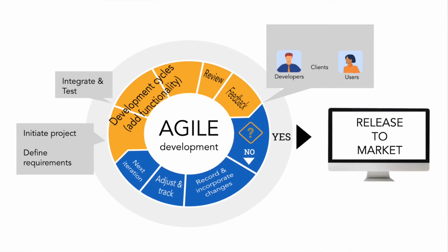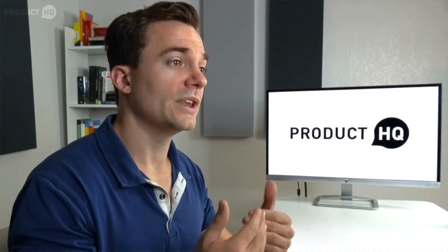Now, let's go ahead and take a closer look at how to balance these three constraints in a practical setting. In the traditional software model, project managers fix the scope by creating a big, thick bundle of requirements up front and agreeing to deliver them all. As development gets underway, the team deviates from the original optimistic plan, be it that things will run late or their cost increases. And this situation helps us to understand human anxiety a bit more. When faced with a fixed scope, late and over budget, well, the natural reaction of many customers, clients, and companies is to cut and burn the scope in a drastic effort to adhere to the schedule and budget.